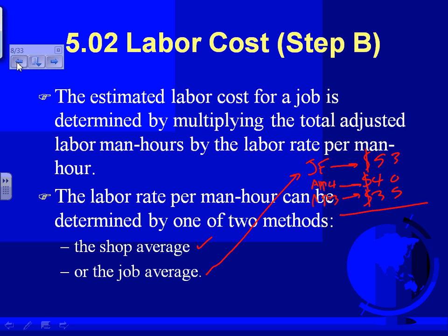I have a job and I'm sending a journeyman and 2 apprentices, minimum. And how much? 128. Now we'll look at the dollars. I'm going to divide 128 by 3. That will give you $42.67, $43, give or take. So my job average for this job is $43.